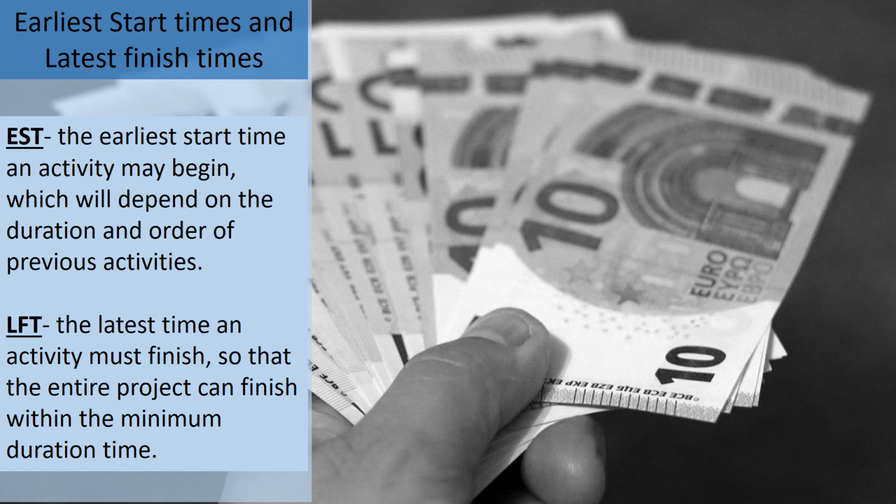EST is the earliest start time an activity may begin, which will depend upon the duration and order of previous activities.